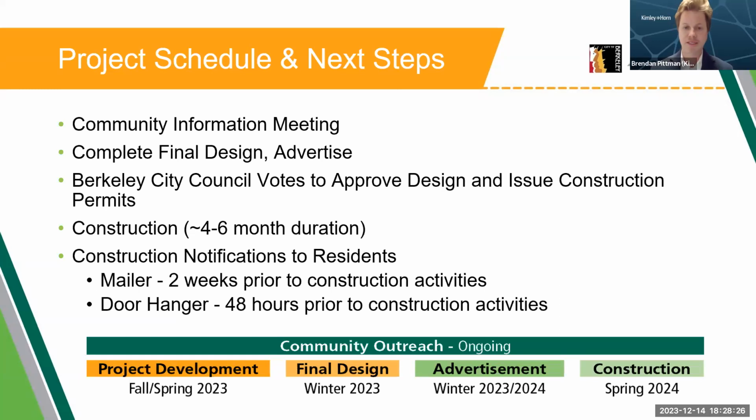2 weeks prior to construction activities, a mailer will be sent to residents within and near the project area to notify of the upcoming construction activity. 48 hours prior to construction activities, a door hanger will also be placed at properties adjacent to those specific project activities. Construction is expected to finish up in spring to summer 2024. That wraps up the project-specific presentation portion of the meeting.